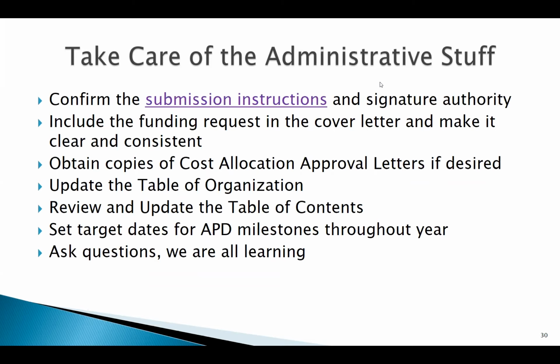set due dates for various aspects of your APD throughout the year. You know, if you only have that target date for maybe right when it's due or a month before it's due, you're probably going to run into problems. So stepping back and saying, what do we need to get accomplished in this next year, and where is there a natural fit between the due dates or some of these artifacts that I need to get for my APD, and how can I spread that out throughout the year.